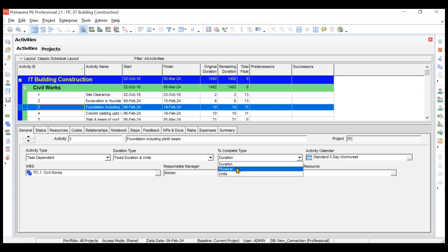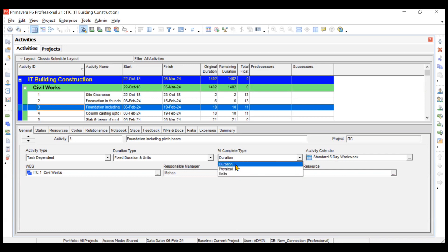In construction, duration-based completion is very rarely possible, so most activities use physical percentage completion type. Physical means the activity is independent of duration — it depends on work or quantities accomplished. For example, after five days only 40% or even 10% of the work may be done. Units type is resource-dependent: if 100 man-hours are required and 50 are completed, the activity is 50% done — but this is also rarely reliable.